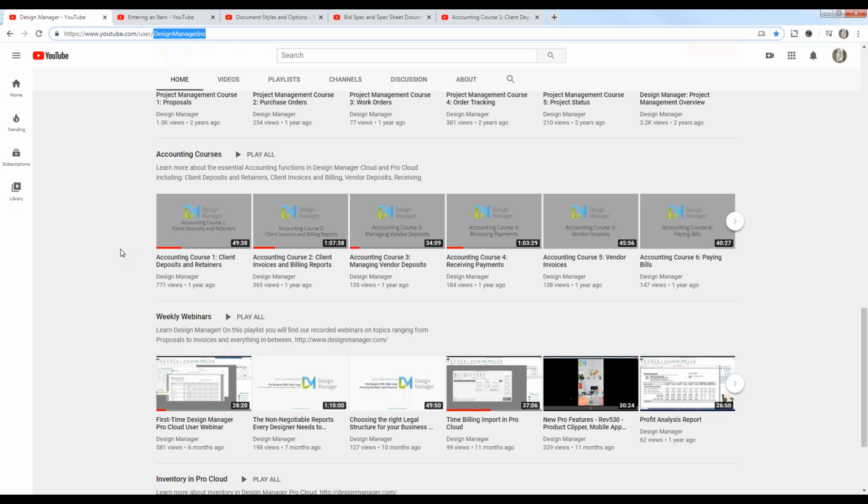Now, most commonly, users are going to create proposals based upon locations or phases within the projects. And you could have proposals based on physical locations, dining room, bedroom, etc., or you could even create them in phases or chronological order. Now, the benefit here is that the goods and services are easily understandable and logically compartmentalized to the client. They're going to understand kitchen, master bedroom, great room, etc., or they're going to understand that this is phase one, and that's going to encompass these agreed upon goods and services, phase two, etc.